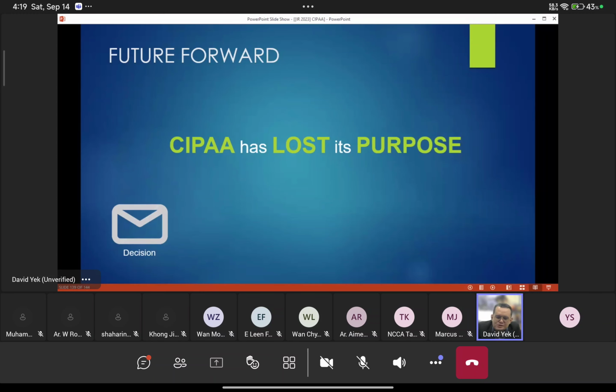Yes, there are people who like that. Because once they get the decision in their favor and this matter goes to court, they can register themselves as a creditor, so they at least have some locus standi to claim back their money. So they want the decision, even if it's temporary finality.